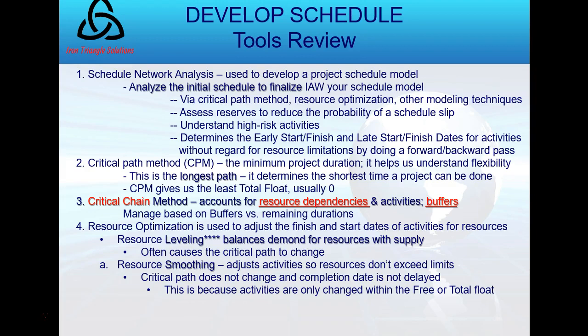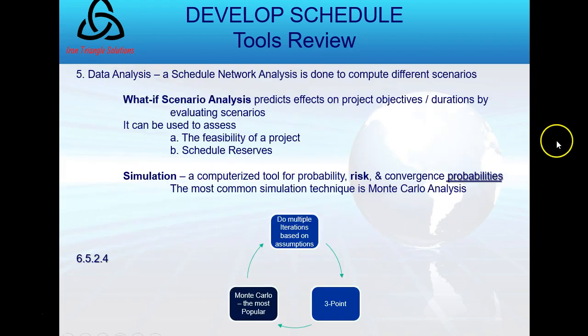As opposed to resource smoothing, which is going to adjust activities so my resources don't reach critical mass or their own limits. And in that case, resource smoothing, the critical path does not change and the completion date is not delayed.